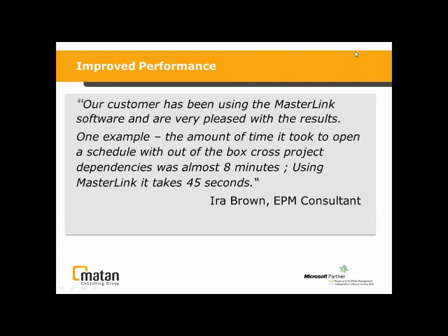That's a very good question, Mike. Basically, I don't look at it from the number of lines that you have in the project. The view is who is managing the different work packages. So if I have one manager that is actually responsible for a work package and it contains 400 lines or 1,000 lines, I'll have one work package for that manager. Okay? So it really depends on who's in charge. Now, we can take this into the process world and say, okay, can one person manage 1,000 lines in, I don't know, 2 or 3 months? Is that something that's manageable?